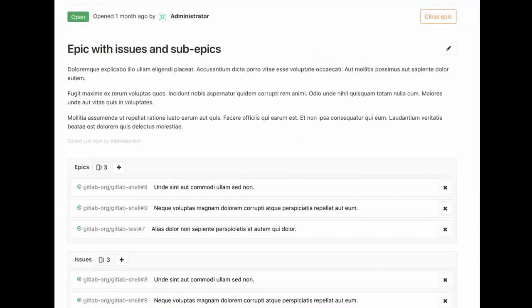Multi-level child epics. Epics and issues work great together to provide flexibility in defining longer-term work plans. However, they are still limited to providing only a two-layer structure. With this release, we are introducing child epics. You can now have an epic containing both issues and epics. This allows you to create multi-level work breakdown structures.